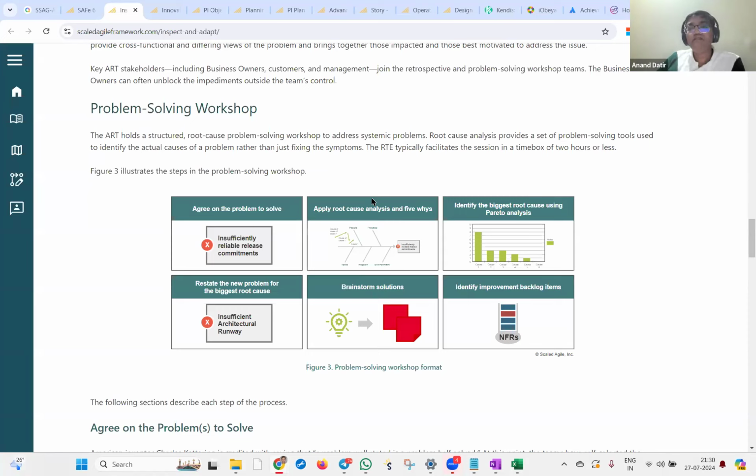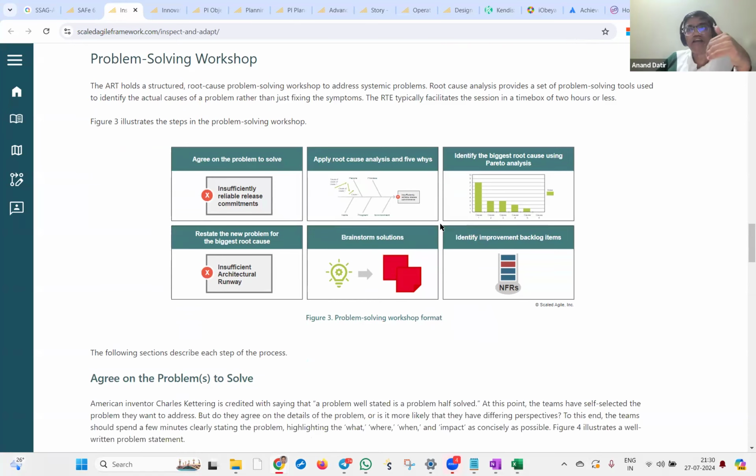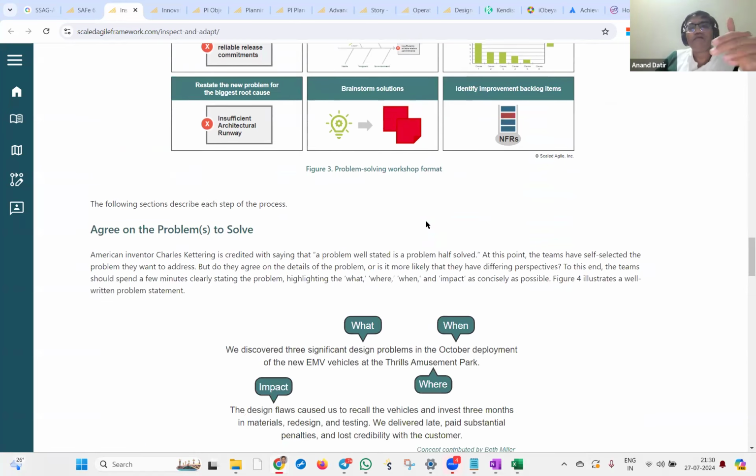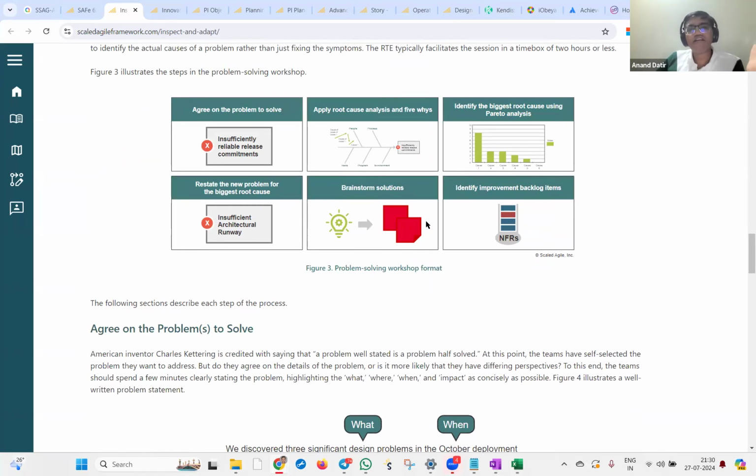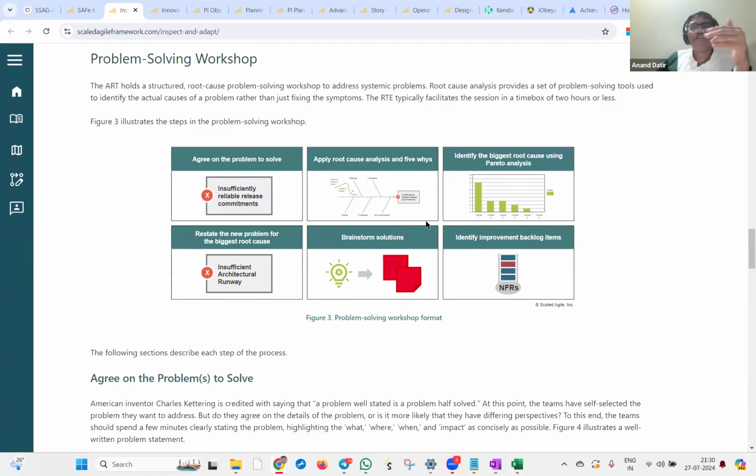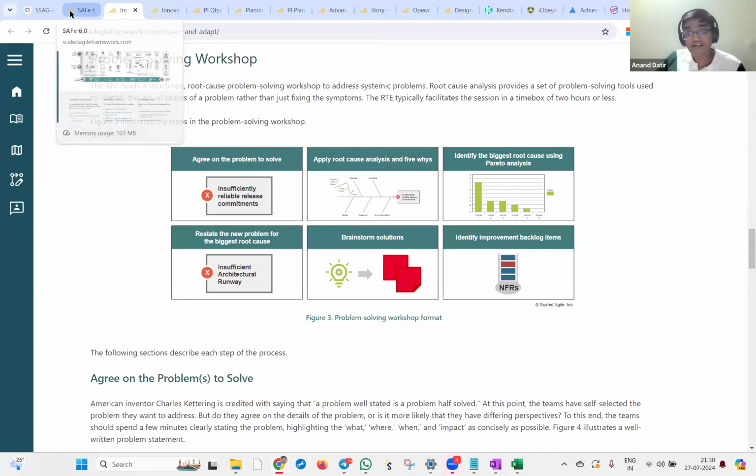However, every team needs to participate in identifying the root causes of certain impediments at a team level, or come up with some analysis. There are tools recommended by SAFe, like the fishbone diagram or 5 whys analysis. You can list down the top impediments which were not resolved by the team and the reasons for that.